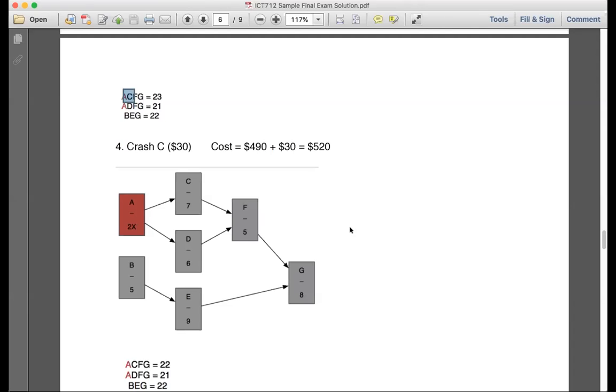The reason for 1 day is that usually we have indirect cost and direct cost. For example, the cost of a machine: every day you're renting that machine, you'll be paying for each day of that machine. So when we reduce it by 1 day at a time, we can know what's going to happen to the cost of that machine we are renting and how much money we are saving. Does that make sense? Yes, sir, a bit.